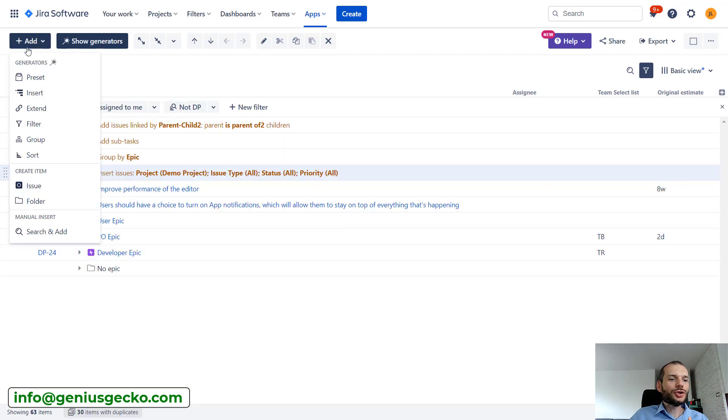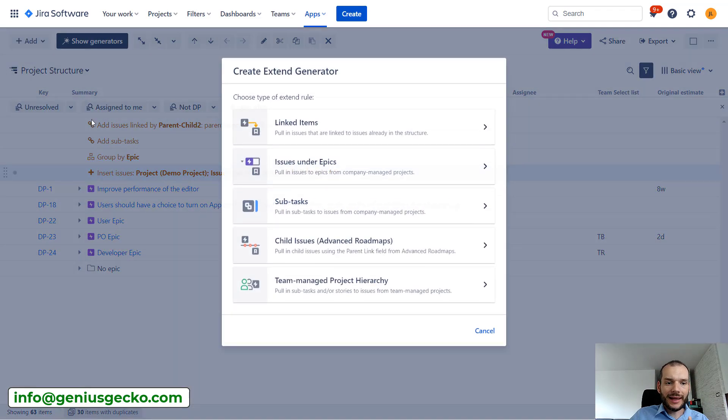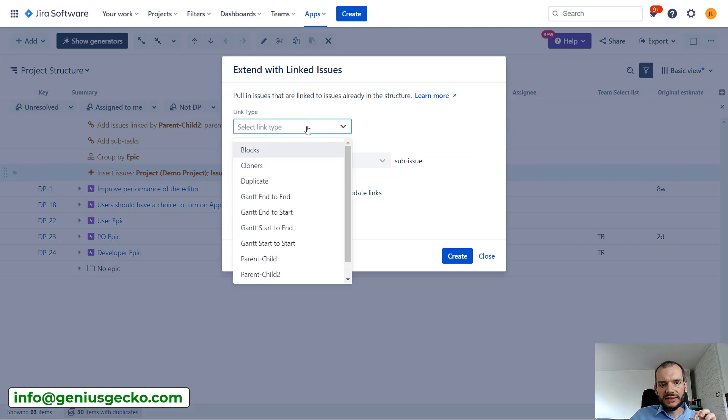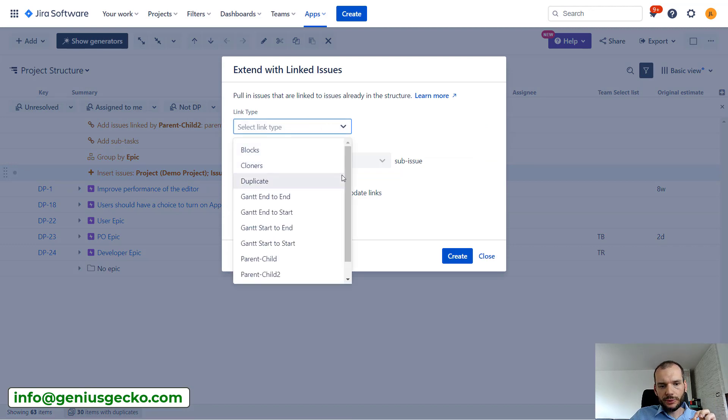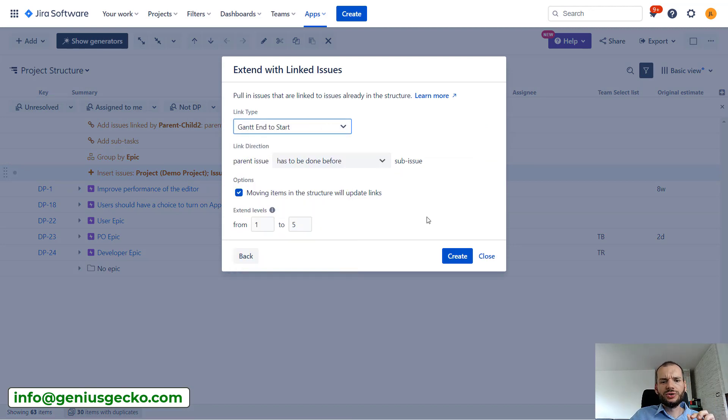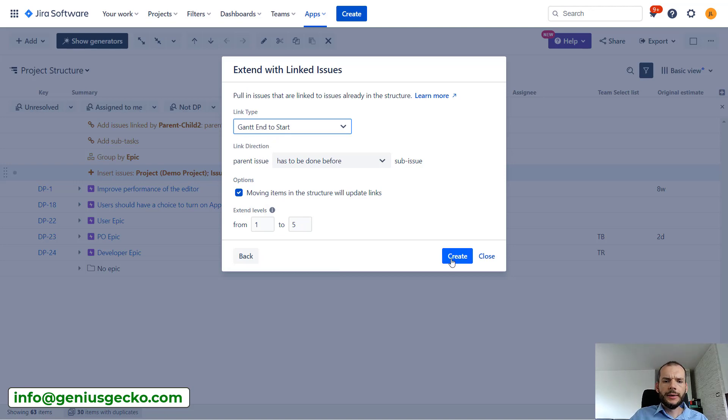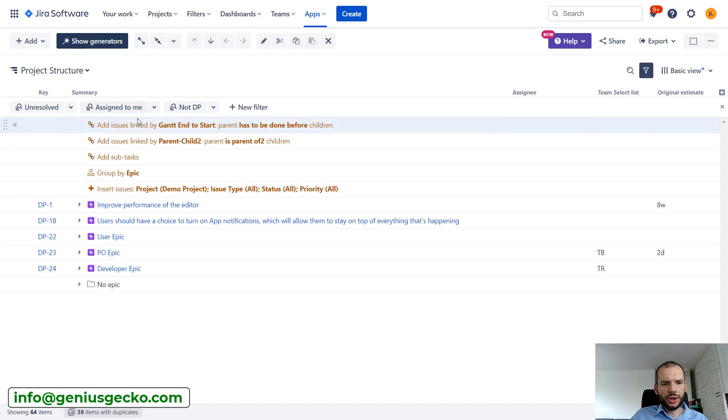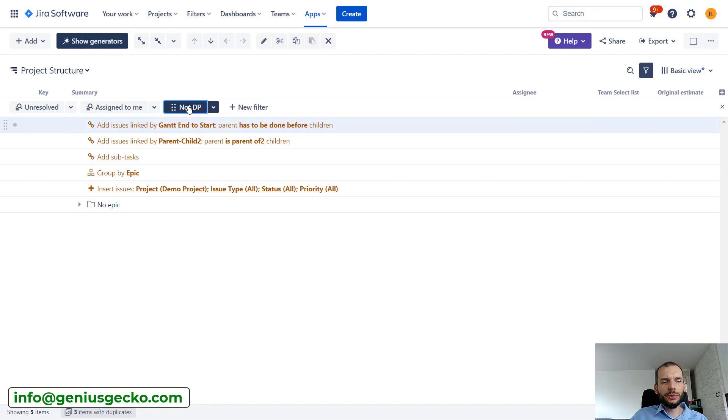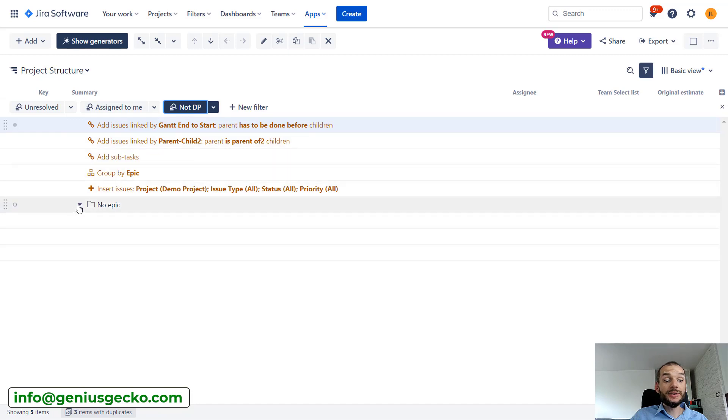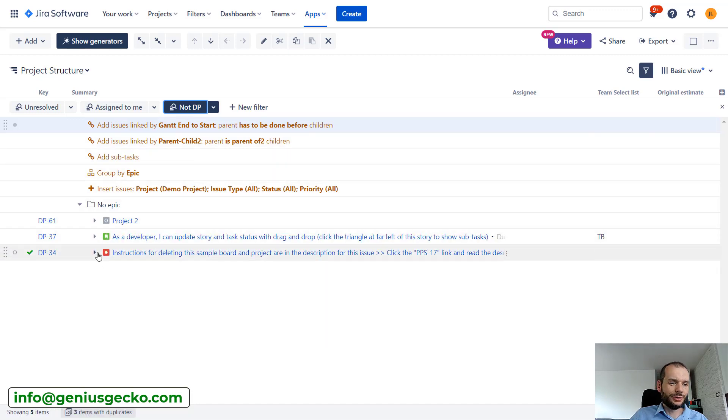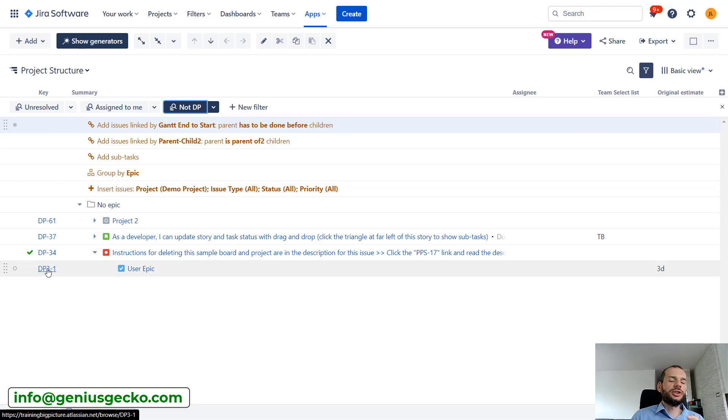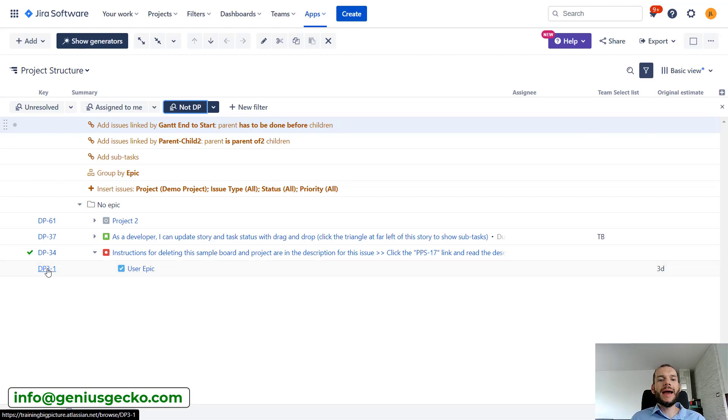So let's actually do an extend also based on the link. But this time I will select Gantt end to start link. This normally shows dependency, but I will use it to pull in additional data. Okay, it was pulled, the generator appeared. Now I will do the filtering and you can see that there are some tasks. These ones are still from demo project, but the children is from demo project three. So I've pulled some additional tasks from other Jira project based on the links that exist between the issues.